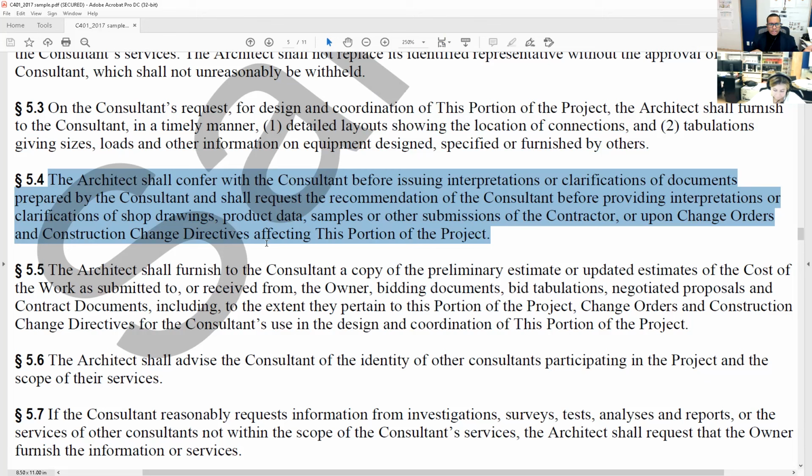Like a bathroom vanity change triggers a change in whether the faucets are three hole or single hole, which is something I'm dealing with right now, or widespread or single. Some of those vanities have requirements for lighting. Some of them come with lighting in them too, and you're replacing all that stuff, and it's going to trigger a change with the plumbing engineer. It's going to trigger a change with the electrical engineer. It's going to trigger a change maybe on the ceiling if the height of the vanity changes on the space. It's really not your average Joe's. Everything's got to be thoroughly coordinated.